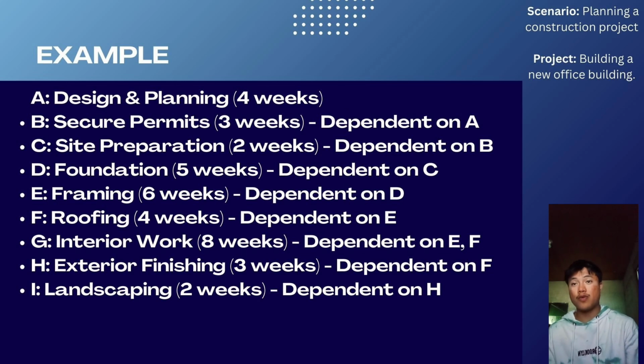And G, interior work, 8 weeks, dependent on E and F. And H, interior finishing, 3 weeks, dependent on F. And finally, I, landscaping, 2 weeks, dependent on H.